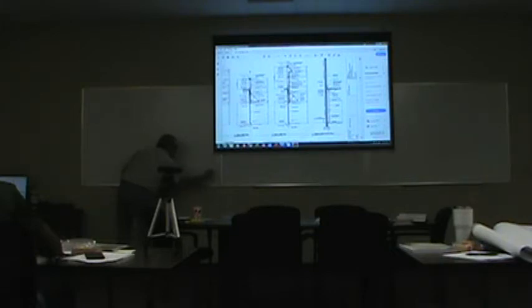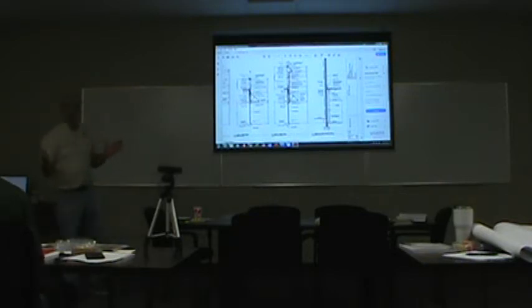Now, as a practical side and quality assurance, you're probably not going to do that metal, that eyebrow, with EIFS wet trade, such as EIFS or stucco or block work, because of slop all over it. So you may make a judgment call in your schedule to move that further until after that activity. Okay? We good? You're asking for clarification on what EIFS is.